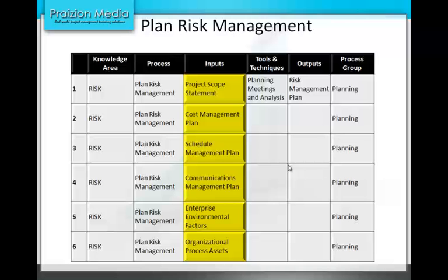Again, your cost management plan contains information about how risk budgets, contingencies, and management reserves will be reported on the project. So when you think about management reserves, you think about unknowns. Management reserves are for unknowns. We call them unknown unknowns, things that you had absolutely no idea could occur on the project.